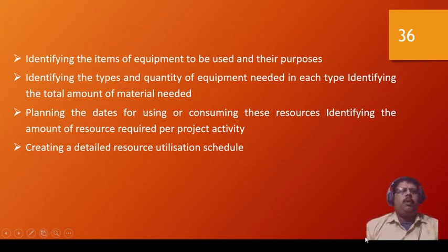The next part of resource planning is the dates. Planning the dates for using or consuming these resources is the next factor, and also identifying the amount of resources required per project activity. This is about how these resources have to be utilized, because time is also a resource. How the resource has to be utilized, and when, and creating a detailed resource schedule. These are all the parts that come under resource planning.